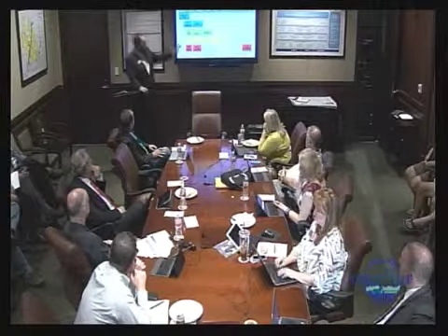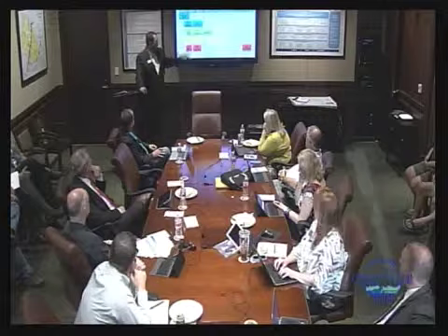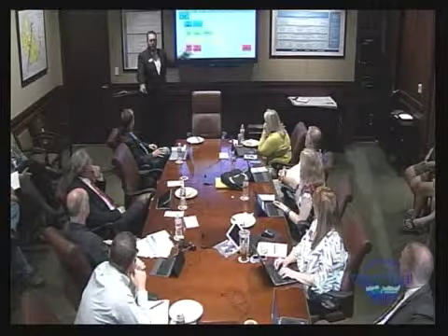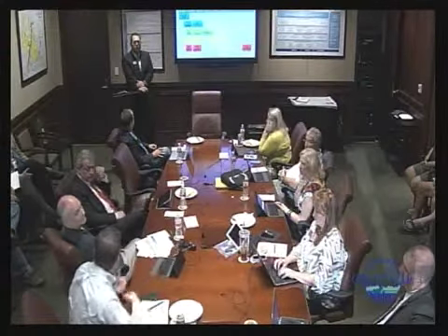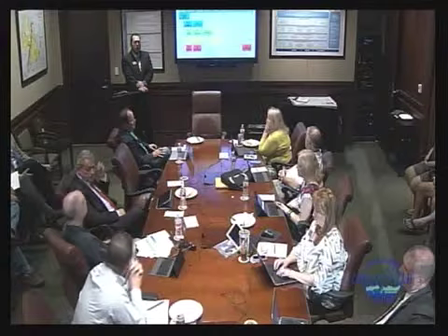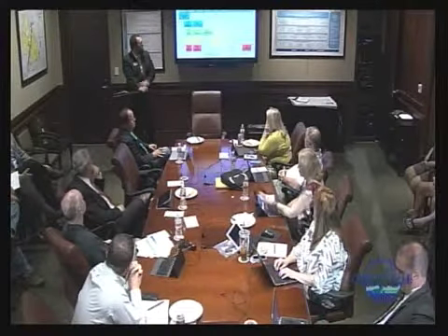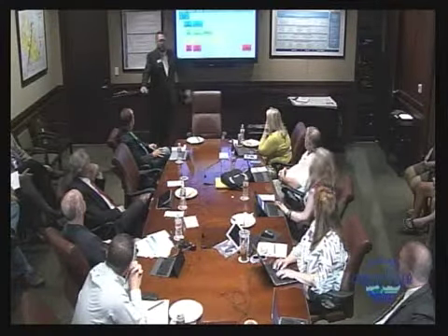We could actually delay the final design and acquisition until later. Given the several year lag time on that, conditions can change. Just prioritize and go with which is first. And that may actually allow phase 3 to be constructed a little bit sooner.